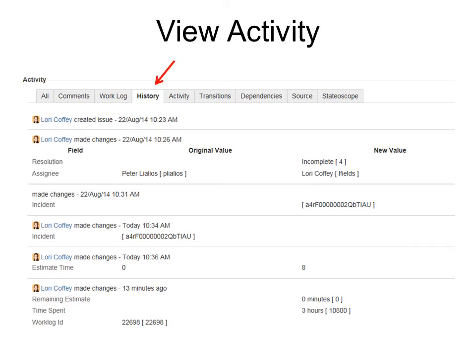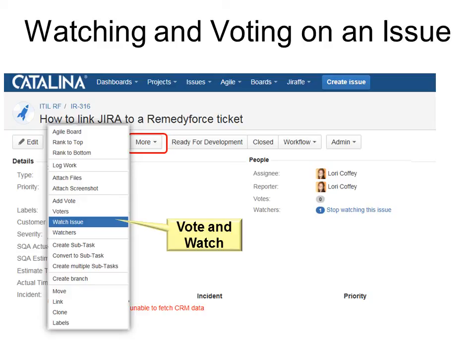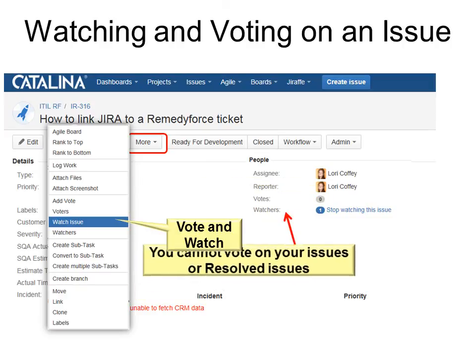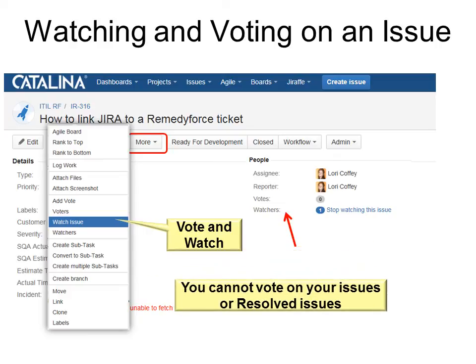To view activity, you can go to history or you can go to all and see all the history of what's happened on that issue. Also, you can watch an issue, you can vote on an issue, and you can see what other people are watching on your issue. Who's watching it? Are people interested in your issue? Because sometimes it's hard to determine which issue comes first. And if you can see a lot of people are watching or voting for it, then you probably will want to put that to the top of your priority list. However, you cannot vote on your issues or any resolved issues.